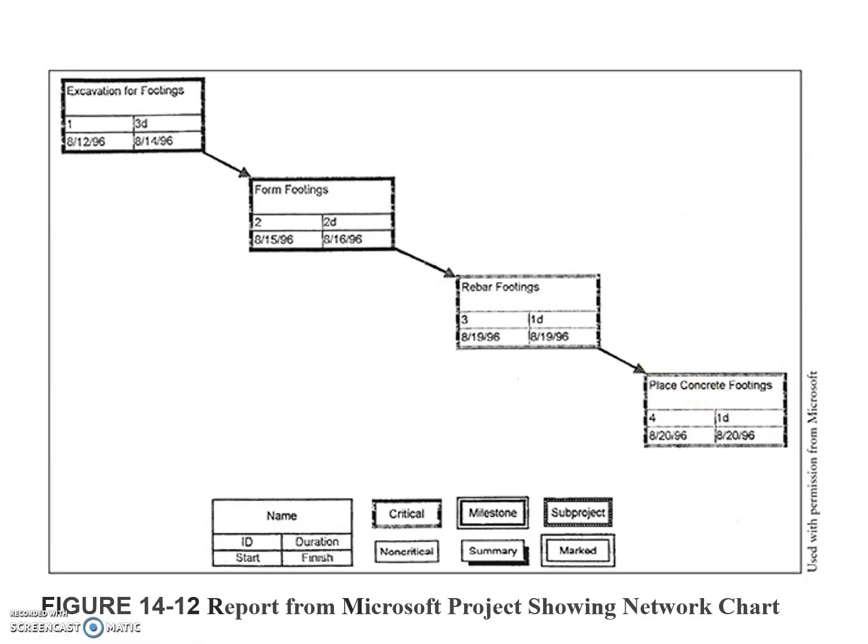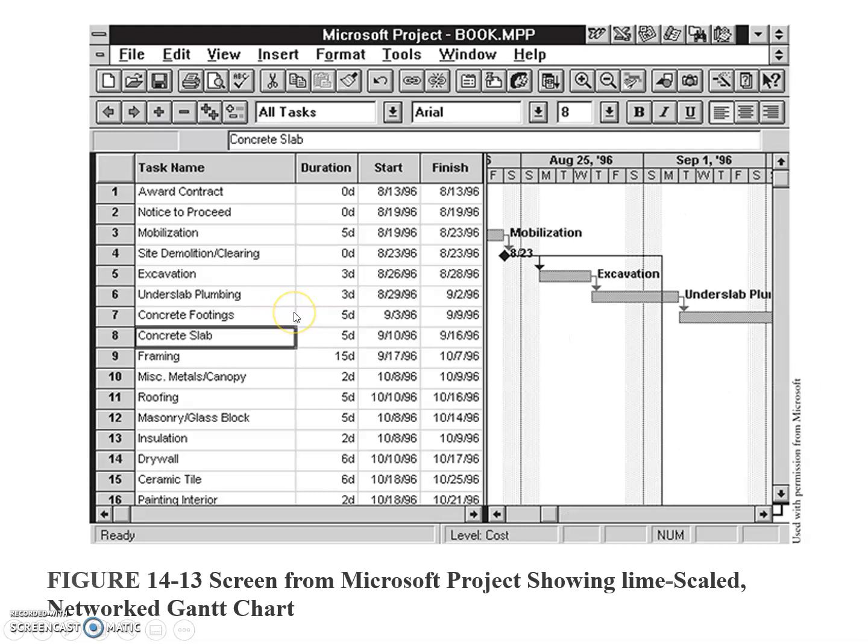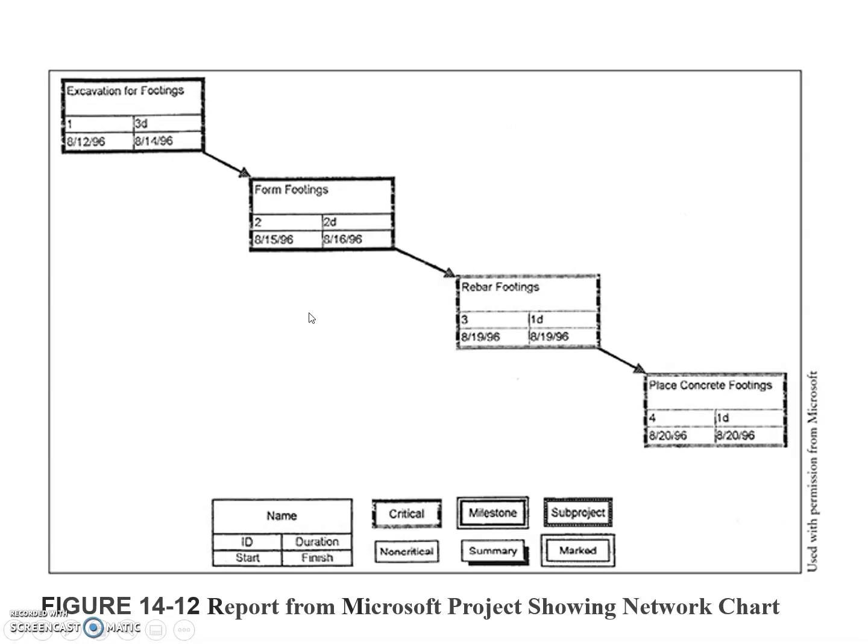In addition to activity duration, resources such as manpower, costs, equipment, and so on can be attached to the activities on the network, and a typical start to finish, or finish to start, can all be depicted by the network. Lags and lead times are available to provide the user with a more realistic technique for improved scheduling.